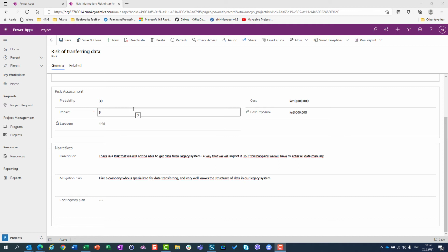And what else can you do? Both of them can be decreased. You can feed the sharks, so to decrease probability, and put the person in a cage, and that is decreasing of impact. And finally, you have acceptance. What is acceptance?